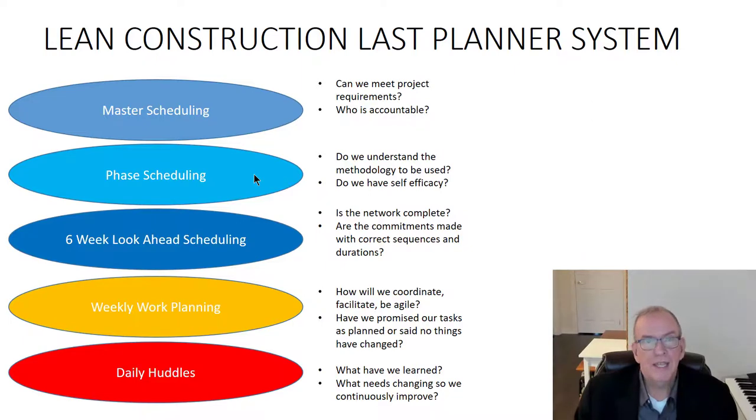Big. And then daily huddles on a day-to-day basis. How are we doing? And there's commitments that were placed. So it really gets into we may be able to do this, to we should be able to do this, to we will be able to do this, and then updating on each other, and also trying to look at best practices and tweaking things through these iterations day by day.